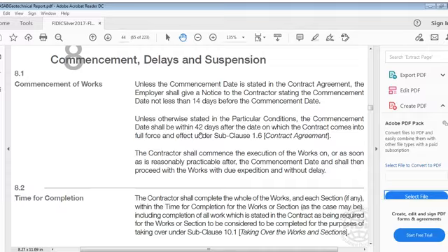But it is the fault on both sides. Because of that, there is a cost. There are many reasons, and those reasons should be resolved from time to time legally. For example, say land was not given in time. Is this the fault of the contractor? It's not the fault of the contractor. It's the fault of the client.